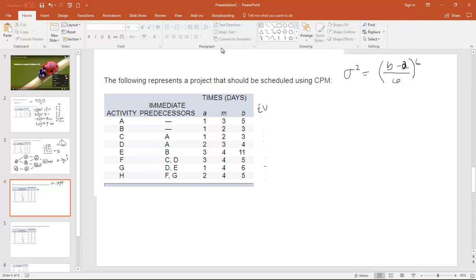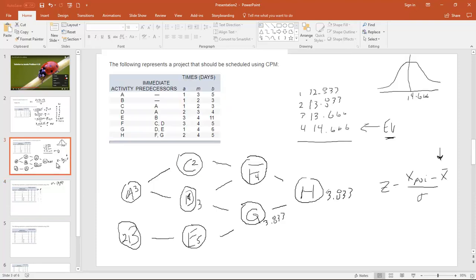We went down there, we got 8 of these. And you could just sit here and just knock, knock, knock, get all 8 of them calculated. But a little bit of a shortcut is we're only going to be interested in this critical path for this part of it. So calculating the other 4 is a little extra work. And so on a quiz or an exam or something like that, just remember that it's really this critical path B, E, G, H. It's that critical path that we need to calculate these for. And you can convince yourself of that, or you could just believe me. You can go back to the book and look through there and you can understand where this thing is headed.